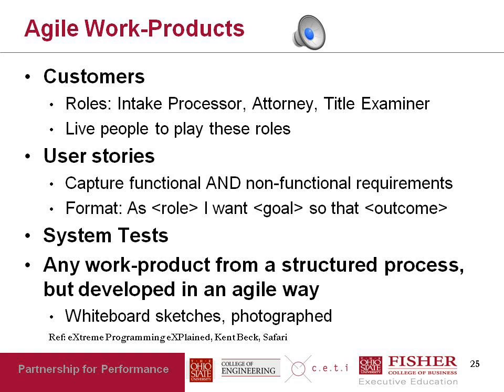The first such work product is a user story. You'll see examples of user stories in the subsequent slide. But a user story is used to capture both functional and non-functional requirements. I hope you still remember what non-functional requirements are. The typical, accepted format for capturing a user story is shown here: As a role, I want a goal so that the following outcome takes place. And you'll see an example of that in the next slide.